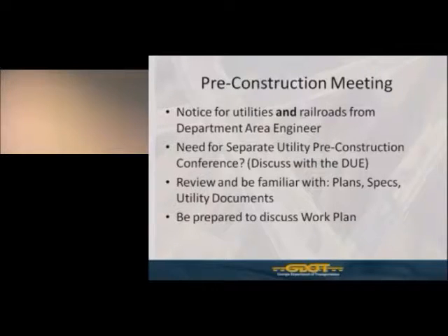Depending on the complexity of the utility involvement on that project, the district utility office may determine that we should hold a separate utility pre-construction conference. This would be so we could sit down with all the utilities together and discuss the adjustment schedules and the plans and so forth, and be prepared to discuss all those at a later date at the pre-construction meeting. Please ensure that you attend this pre-construction meeting and any subsequent utility coordination meetings held on the project.